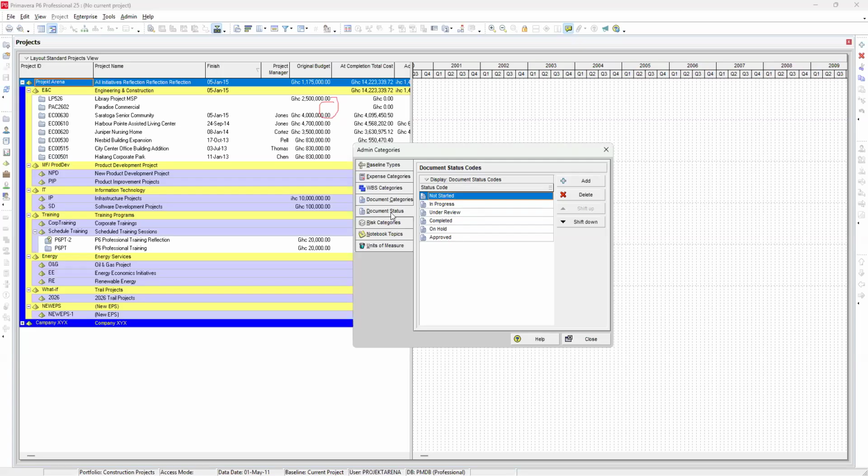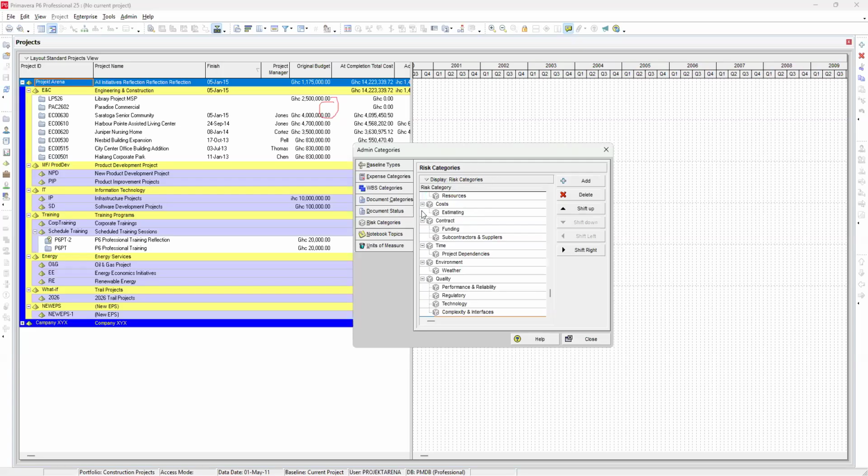Then we have risk category. We all know risk uncertainties we should expect on the project. And these uncertainties can be categorized. So you have project management risk, and this project management risk can come from anywhere. Prioritization, if we get our prioritization wrong, our requirements, planning, control, communication, all of these we can add on, depending on the risk we see associated with the project.